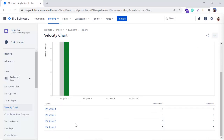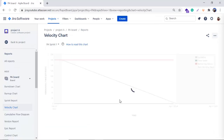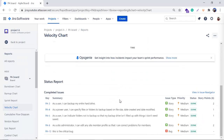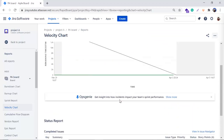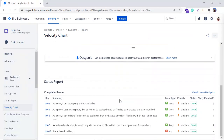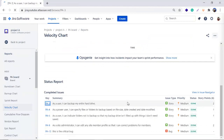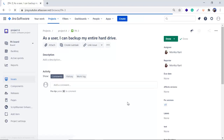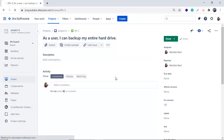Just below the chart you can get all the information about the sprints. In Sprint 1, the commitment was six and the completed was also six, which is why the gray and green bars look equal in height. If you want to see the details of a sprint, you can simply click on it and it will give you a complete sprint report. You can also click on any particular issue to open the issue window and check its details.